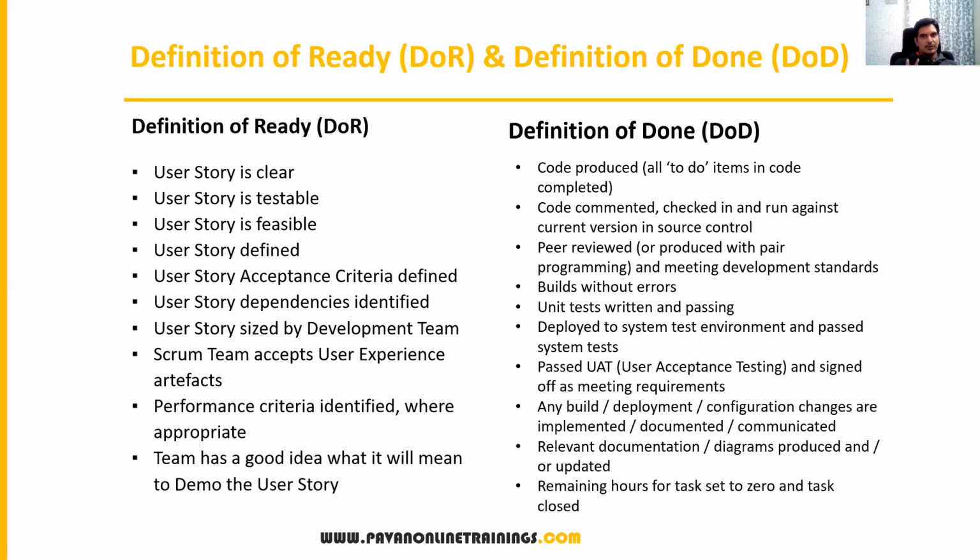So we use these terms: definition of ready, definition of done. When I say anything is ready, these are the parameters we have to consider. Similarly, when something is done, we have to check whether these parameters are satisfied. If they are, then we can say the particular story is completed or done, and it is ready for releasing to the customer. That is the meaning of definition of ready and definition of done.